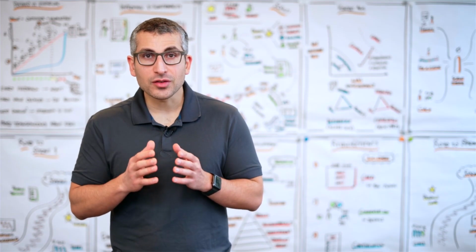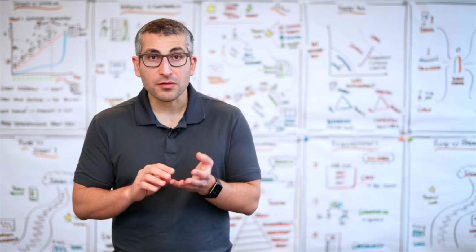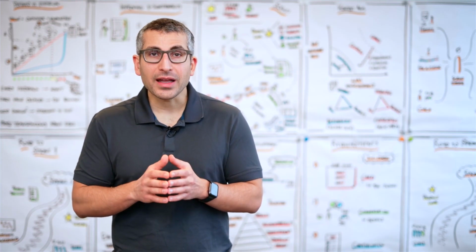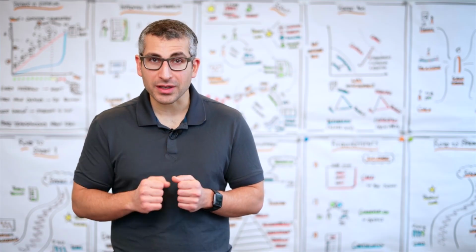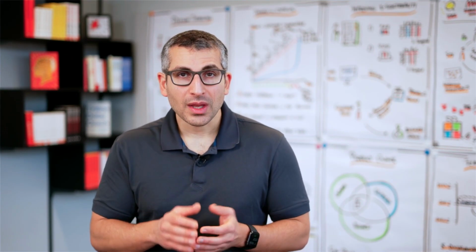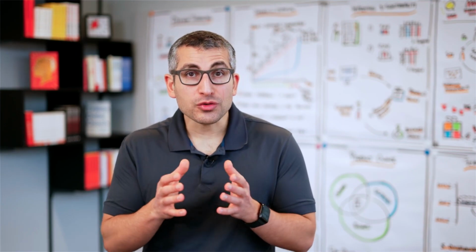Writing epics as goals has many benefits. First, it's much easier to create them, and second, it is much easier to then prioritize them. So let's again look at the example of the truck. A goal was to have better safety. Another goal was to have less back pain. And each of those goals can be an epic in our initial product backlog.